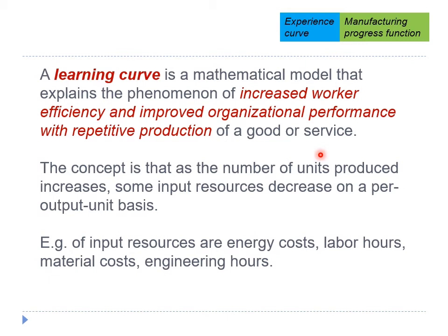The learning curve effect was first observed in the aircraft and aerospace industries with respect to labor hours per unit. However, it applies in many different situations. For example, the learning curve effect can be used in estimating the professional hours expended by an engineering staff to accomplish successive detailed designs within a family of products, as well as in estimating the labor hours required to assemble automobiles.